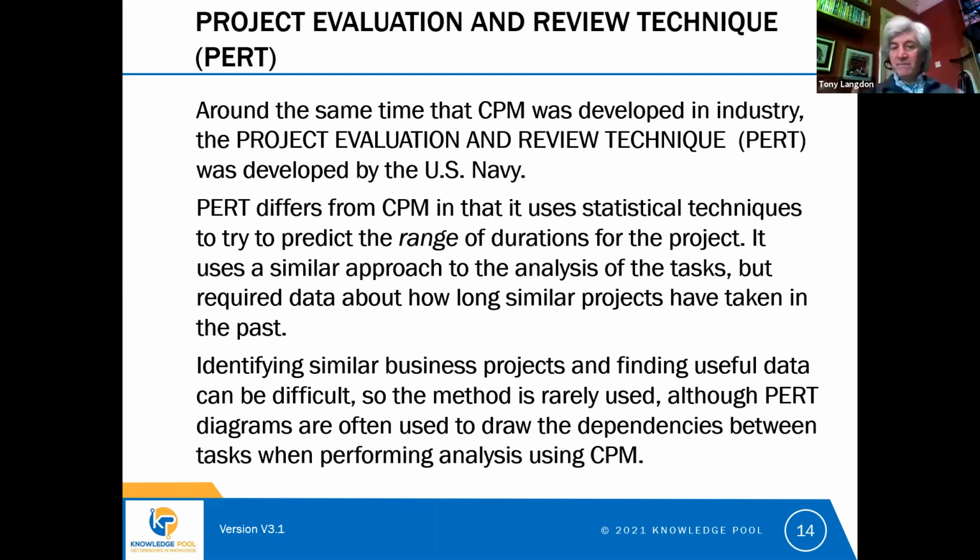So PERT differs slightly in that it's using statistical techniques to try to tell you the likely range of durations for the project. So it uses a similar approach to analysing the tasks, but in order to apply the statistical methods, it needs to have some data about how long similar projects have taken in the past.